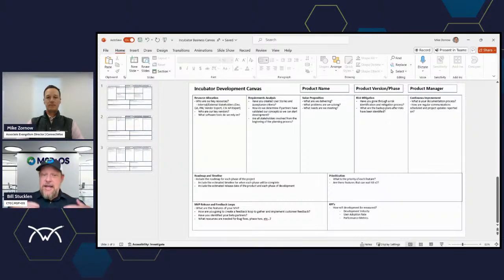So if you want something, you've got to plan that out, and you've got to give yourself a buffer, because anybody that's done development knows things will come in, or you think you have the right user criteria. You get your early MSP partner, and they go, nope, this doesn't do anything for us, we always have to go back to your portal to do stuff. So there are some components to that. You have to be flexible, and Agile gives you that ability. But having a realistic expectation of a 3-month turnaround to be ready to present at a show, you've got to be a little more practical than that. Yeah, I think that's one of the things we hear quite a bit: I want the short runway.